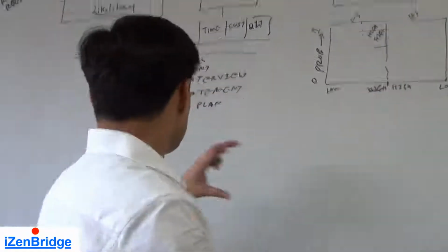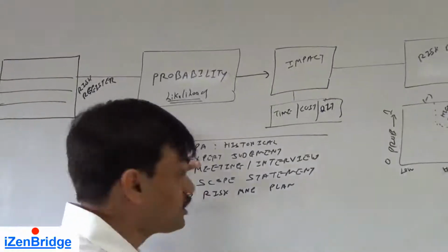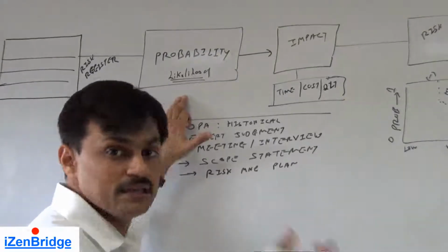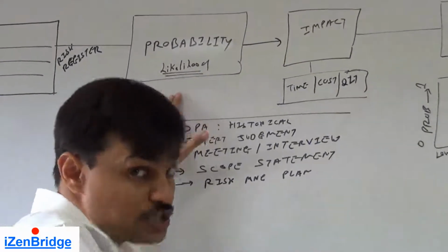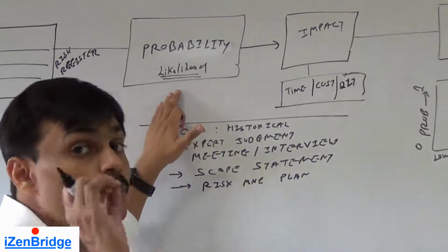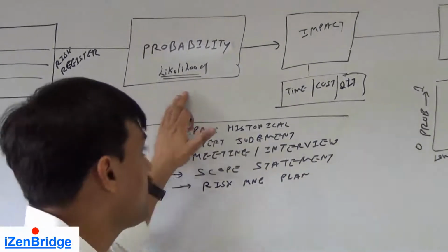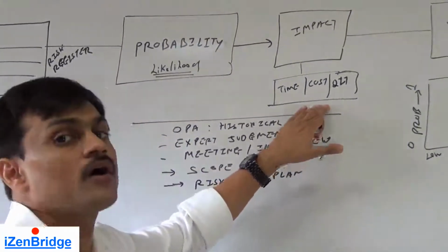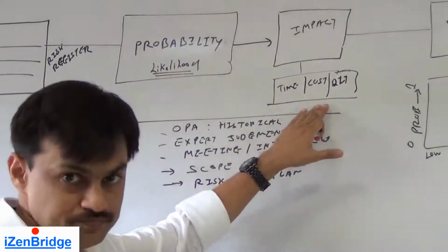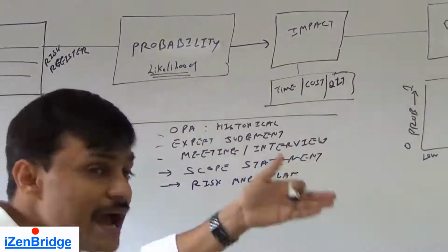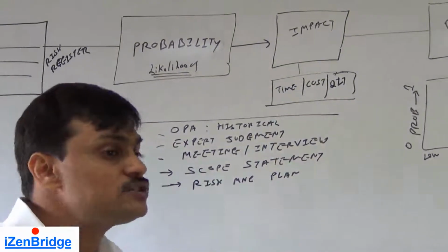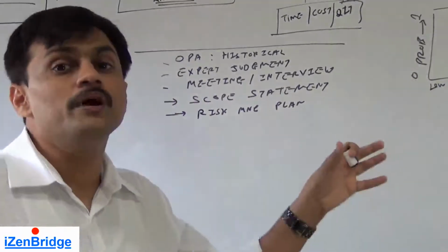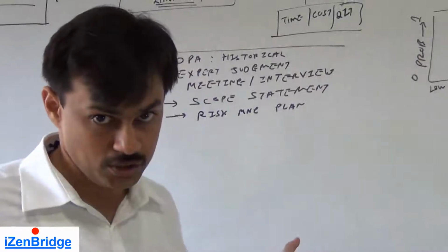final deliverable. Now this risk you can give a probability on the basis of the history of that particular vendor, how well he has been performing in previous projects, or how well he is executing the project. On that basis, you can identify how probable this particular risk is. Then we need to identify, if that happens, what kind of timeline or cost impact it can make on our project. Along with this risk, we may have another risk. For example, if we do not get a given test environment, we won't be able to execute our regression testing.